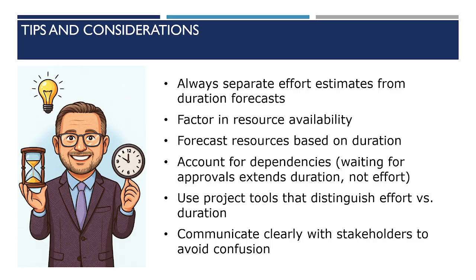But the forecast resource is based on duration. This is probably the most important tip I can give you. When you do budgets and estimates, you want to estimate resource times duration times cost. How long are you holding on to the resources? Because in an example where maybe the person has 36 hours worth of work to do in a week, you still might pay for them to be 40. And so if you only estimate based on effort, you're going to miss that time where maybe they're not as productive or, again, they're still sitting there and you're paying for them.